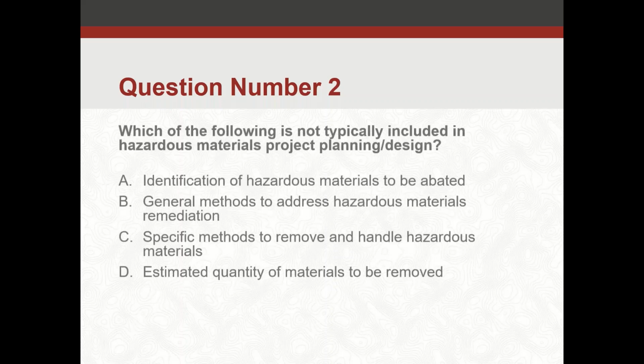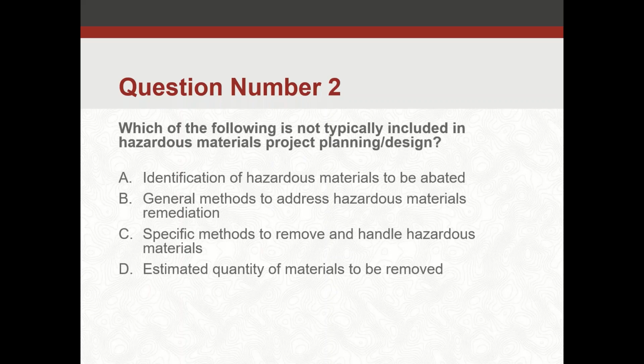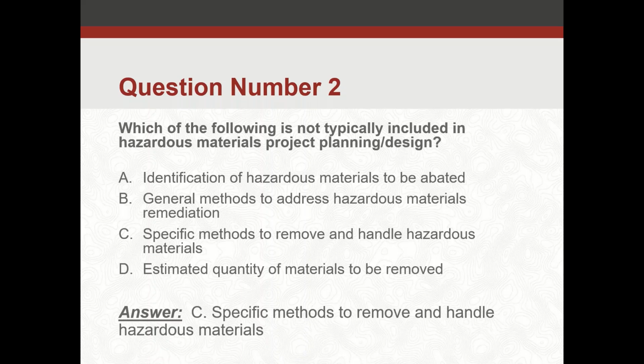All right, question 2. Which of the following is not typically included in the hazardous materials project plan and design? Answer there would be the specific methods to remove and handle hazardous materials.